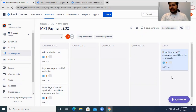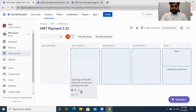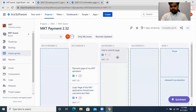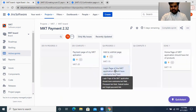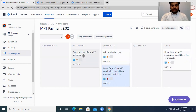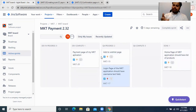'Done' means the task is completed but not yet released to production. 'Released' means the software is deployed to the production environment. However, you cannot expect everything to be completed at once. Let's say the sprint looks like this: one task is released or done, one task is in 'Dev Complete,' and two tasks are in 'QA In Progress.' When you complete the sprint, the done task will be gone, but the three incomplete tasks will come back to the next sprint.